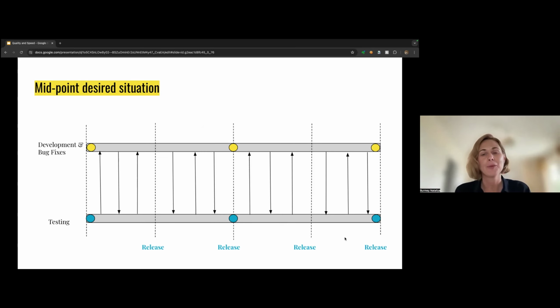For example, when we were releasing the native app, we had a development cycle of 6 weeks. And that was a really long time. And sometimes the timing was unstructured. There would be 5 weeks, 4, 6. Everyone would try to put in the last feature that they really wanted to make it into the release, as very important. But in a startup, everything is very important, right? You want to get as many cool features, improvements, and product growth out there as possible. So we worked quite closely with different people to make that release smaller.